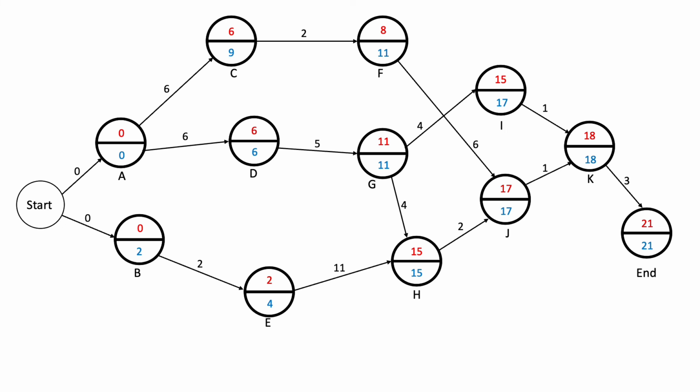So take a look at this completed network. Note that we have a path of tasks from start to finish that must be started as soon as possible to stay on pace to attack in that shortest possible 21 days. We call this the critical path. So, what does this tell General Dave?